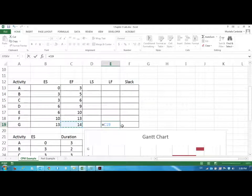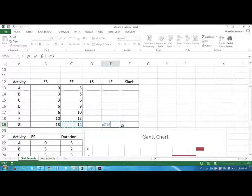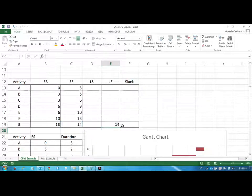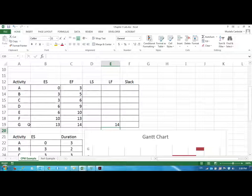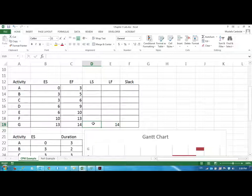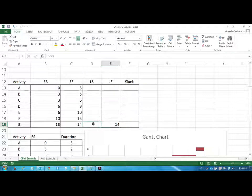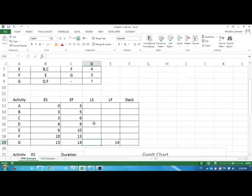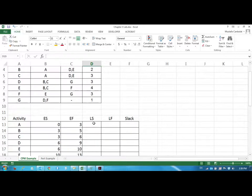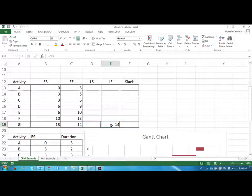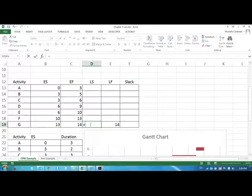So the project has to finish by week or day 14 and that activity G has to be done by the time period 14. Now if it has to be done by 14 when should it start the latest? And we know that because it only takes one day to be completed. So if it is done by 14 it is going to be